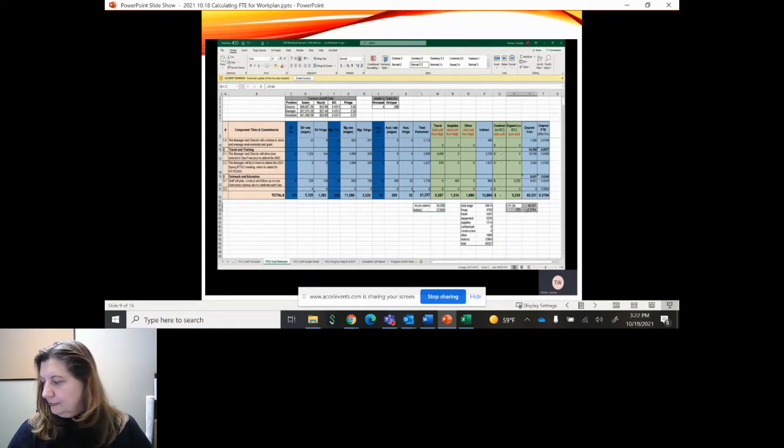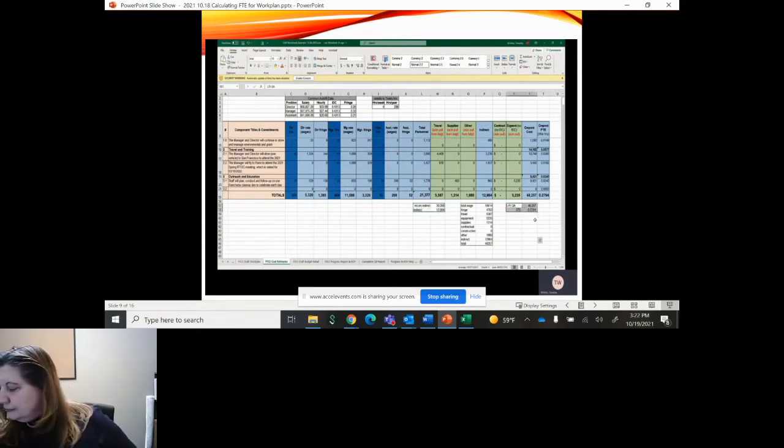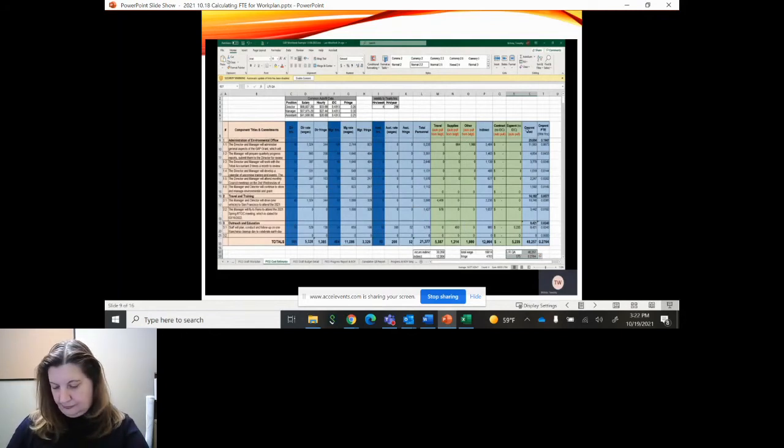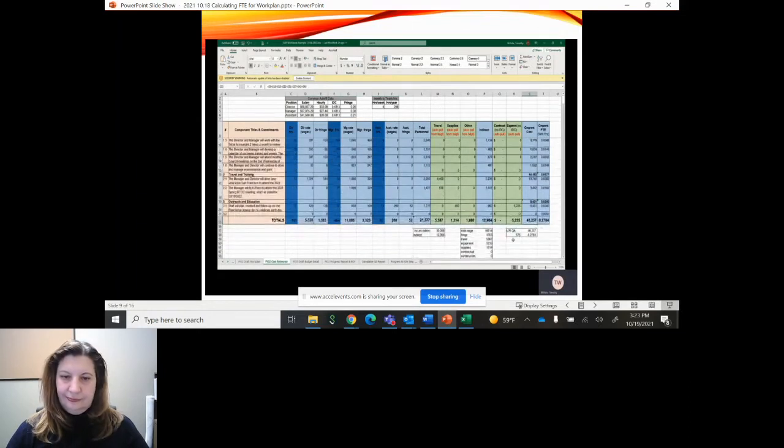And here's one here. You probably realize that a lot of spreadsheets are set up to add things together, north and south, up and down, to get totals. But you can QA that from an east and west perspective because everything that adds from east to west is also supposed to come up with the same total. So that was just another check I built into it, and there's nothing fancy about that. People can put their own checks in.